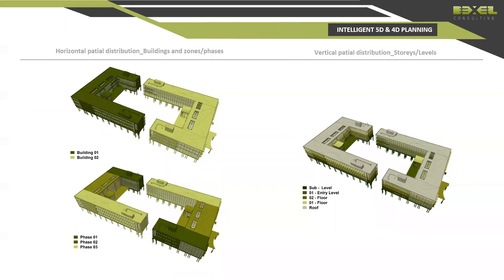For horizontal spatial distribution, you can divide your project into buildings, or larger project elements like blocks, and then divide every building into zones or phases — because executing a whole floor at once would require a huge amount of workers and equipment. By separating each floor into smaller zones, you can work with a limited number of resources and repeat that process each week, optimizing resource use. For vertical distribution, it simply relies on building stories or levels.